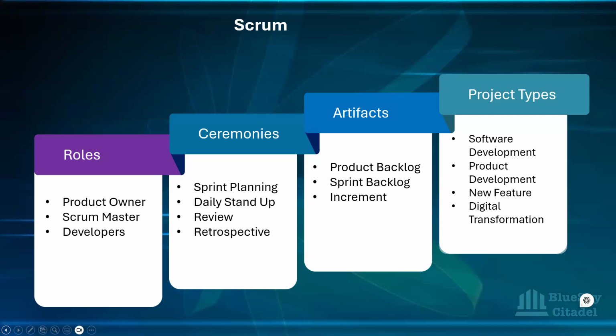And then the daily stand-up is a 15-minute time-boxed meeting where the team members discuss the progress, upcoming tasks and any blockers. It's a meeting we have daily to plan ourselves. To say, okay, this is what we've done. What do we need to do today? Is there anything that will impede anyone, that won't allow for seamless progress of work? That is the meeting we jump into in order to get an update and plan how the next 24 hours is going to go. And that's why we call it daily.